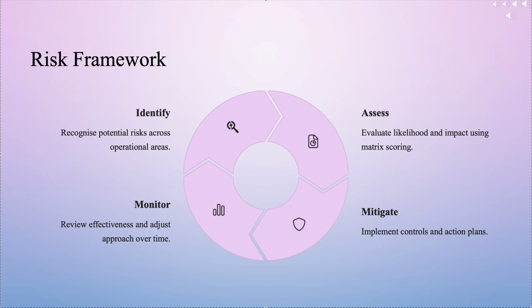For instance, a risk with very high likelihood means it's almost constant, while a very high impact could mean the company has to stop functioning. This structured evaluation allows us to move beyond anecdotal concerns and quantify the true threat each risk poses.